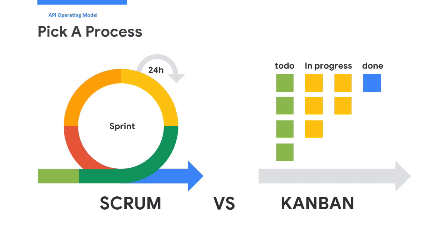On the other hand, Kanban is more flexible and emphasizes continuous flow. It relies on managing smaller tasks that are less dependent on one another, allowing teams to prioritize and adapt more fluidly. Teams that have established effective collaboration and can self-manage within an Agile context often find Kanban a better fit, as it allows for more autonomy and responsiveness to changing priorities.